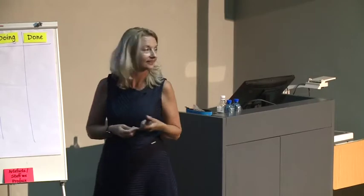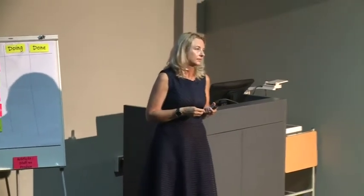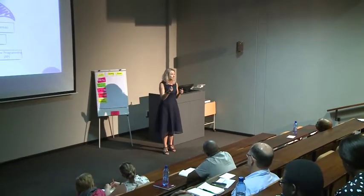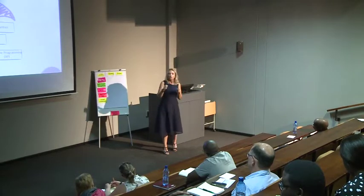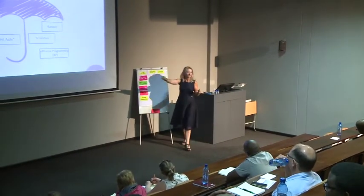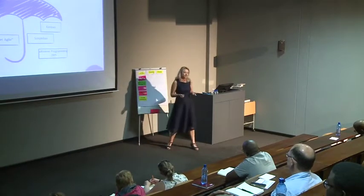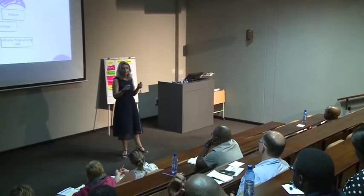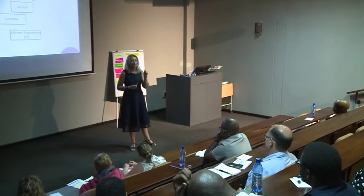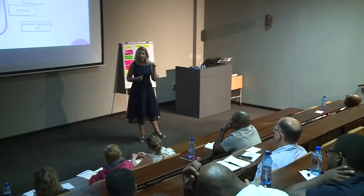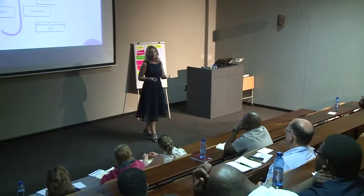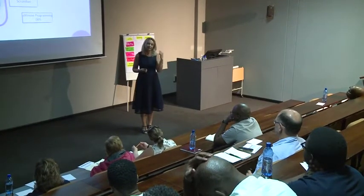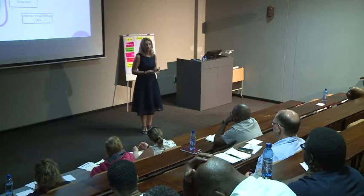We basically say our sprint goal was this, this is what we were planning to do. Unfortunately something urgent came in, so we took some things out. Whatever we take out goes back to the backlog because we still need to do it. Q: What is a stand-up? A: It's one of the Scrum ceremonies. We get together every morning for 15 minutes. The reason it's called a stand-up is because we don't sit down — it keeps people focused, they stick to the time, give updates, and then go and do their work.